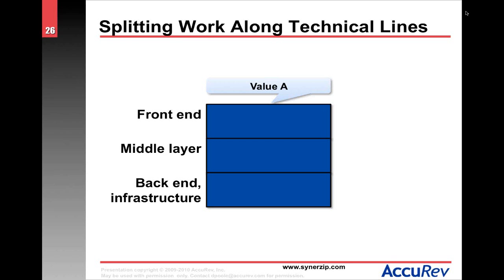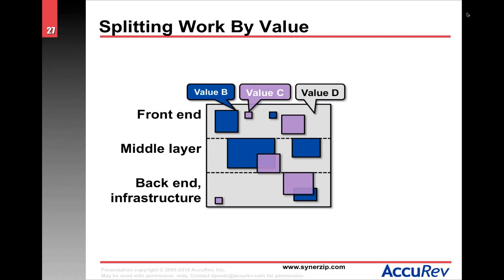until the whole thing is done. And even then, you might come back and say value. The idea is to say, well, even now that was a big project, but you can imagine a smaller feature, and I will do a little bit of the front end, a little bit of the middle layer, a little bit of the back end. That then gives you a little bit of the value.